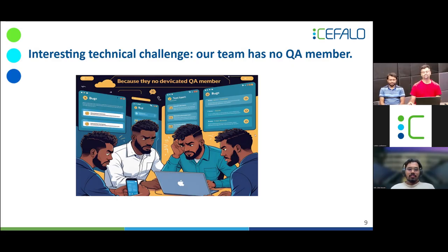Then we figured out, in the sprint planning meeting, a way: suppose a task needs 3 hours, we give the work 5 hours, with 2 hours for testing. And it is not necessarily the member who developed that part, another member can also get involved in testing it. This way we can solve the challenge.